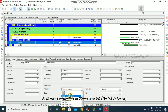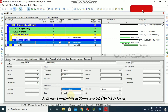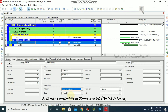We also have finish on or before. It's a restriction that you impose on an activity that limits the latest time it can be finished. The finish on or before constraint affects only late dates. Use this constraint to ensure that the late finish date of an activity is not later than the date you impose — for example, any activity should complete on February or before February.